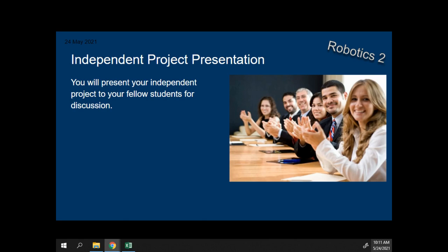What makes a good project in Six Sigma? Okay, stop searching. Listen, I don't have time to search every question. We'll never get through the review. So Six Sigma projects, do you want a project that takes a year for completion? Why not? Because that's too long. So the project has to have a short-term definite goal, right? Yeah, 4 to 6 months.